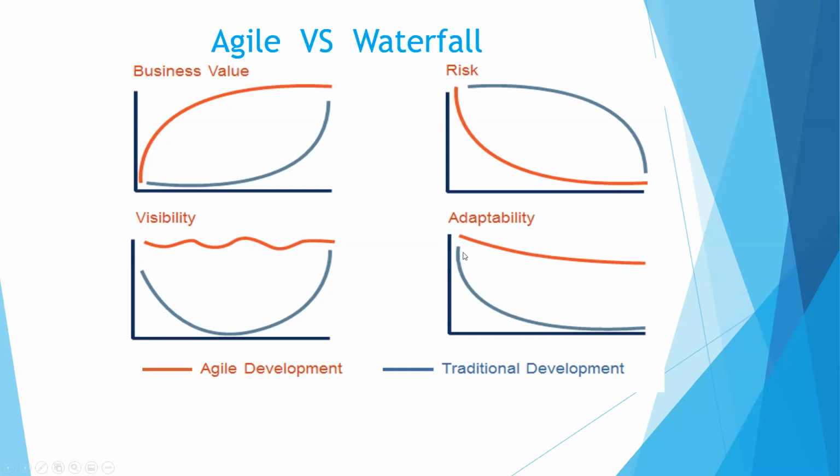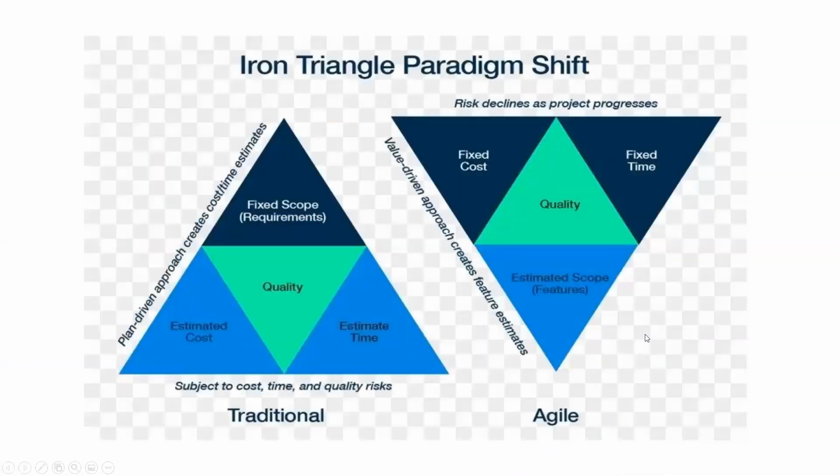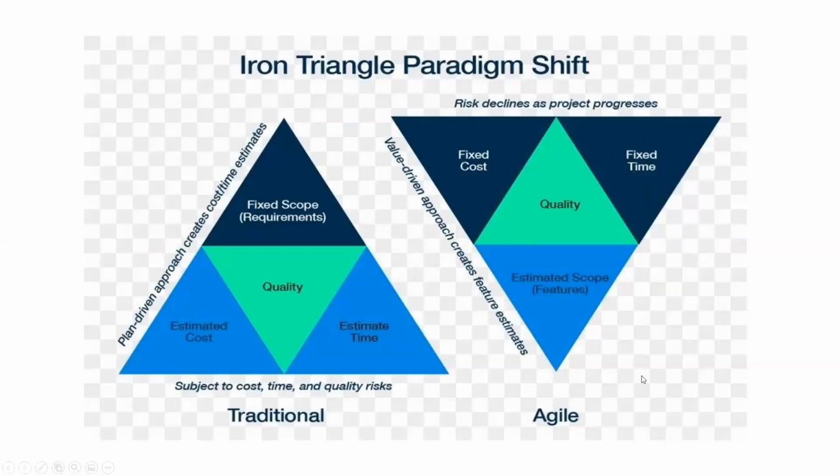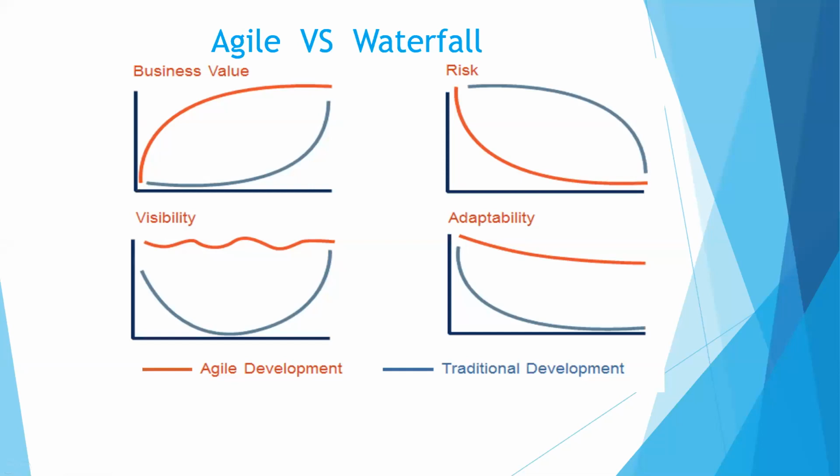Day one, my team were able to complete 2. It becomes 8. By day 5, it's going to be burning down gradually until day 10, when I won't have anything to deliver again, which is going to be 0. Are you getting it? I'll take time to explain when we get there. I don't want to jump to another lecture that we're going to be covering next week.